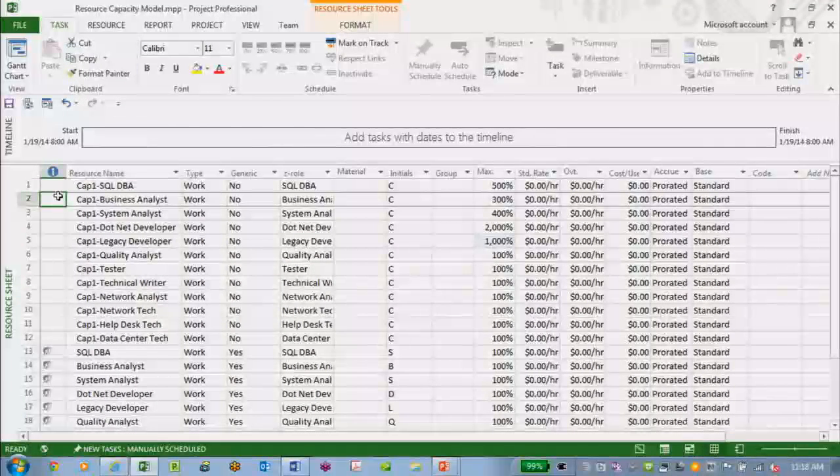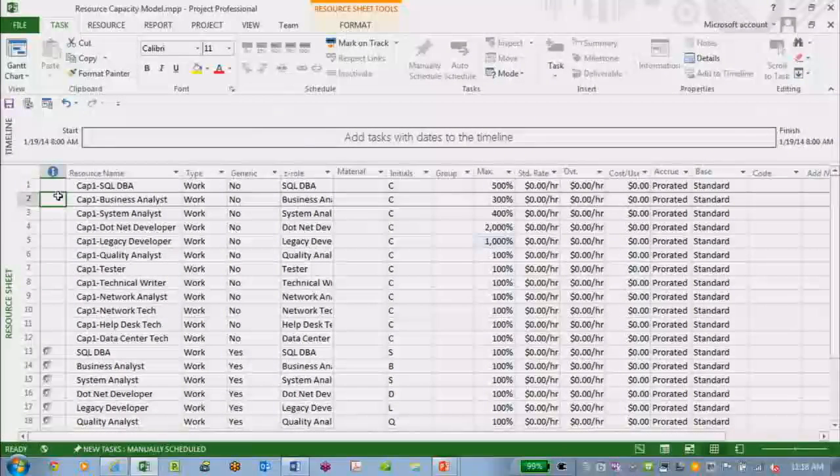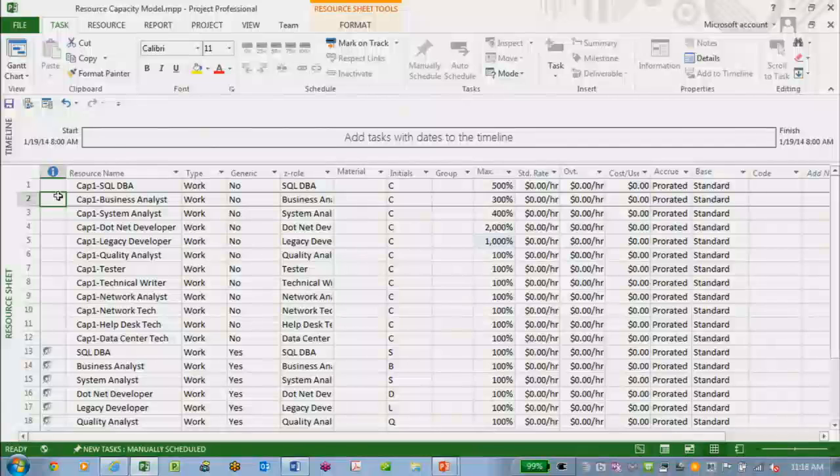And if all we're doing is portfolio analysis here, it's easy enough to spawn projects from these in the enterprise resource pool, in the enterprise project system, right? All we have to do is take our selected projects, export them into Excel, import them into another SharePoint list in the enterprise project management system, and make projects out of them, just the way we did here.